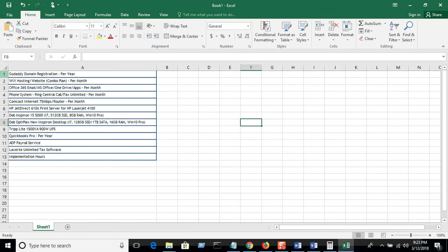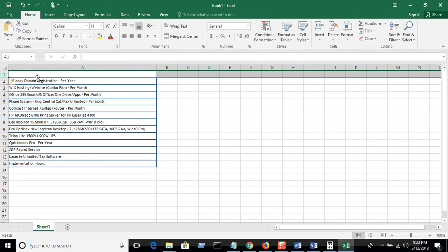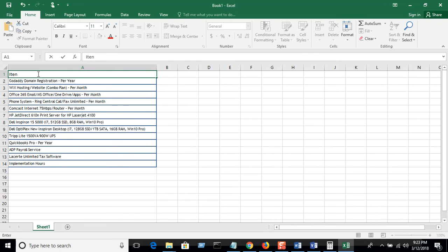Okay, so I'm gonna put in item and hours. It's basically how long it's going to take me to do all these things, right? So I'm going to say for GoDaddy, I'm just going to allocate 2 hours for that. I'm going to allocate 40 hours for building the website. Actually, no, I'm going to say 20 hours because it's a simple website. To set up all the Office 365 emails and everything, I'm going to say 20 hours.